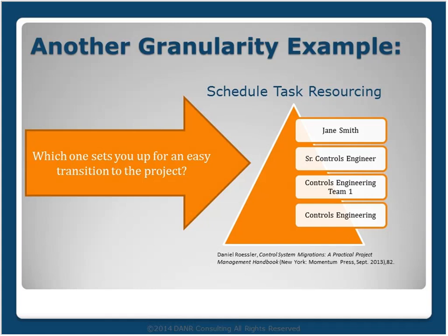In other words, if a client's okay with you going ahead and getting into that granular detail within the schedule at an early phase of the FEL, I would suggest that doing that benefits them as well as you. So consider that as an option. Now, obviously, if they say we're not going to pay for that level of detail at this point, then you might not be able to provide it. But you can always roll these tasks up into summary tasks in what you present to the client. So keep that in mind.